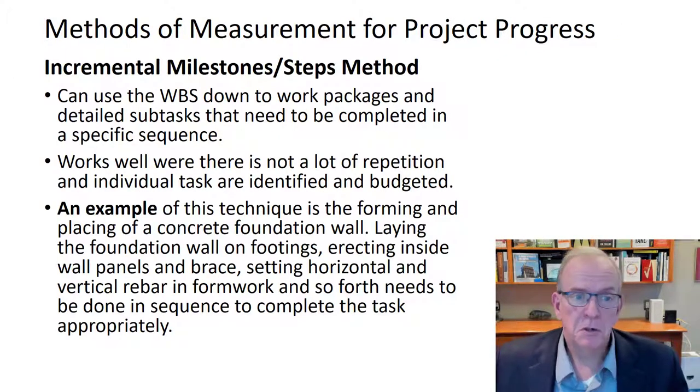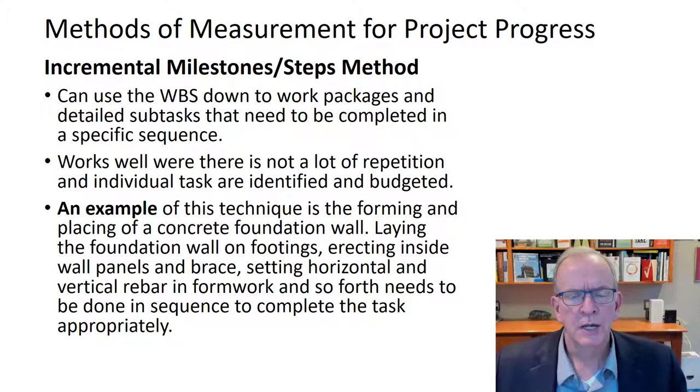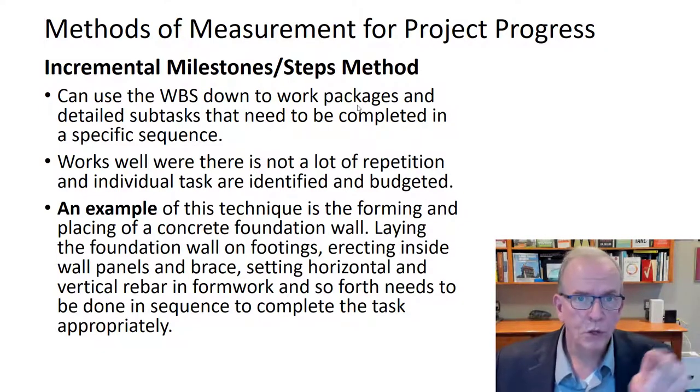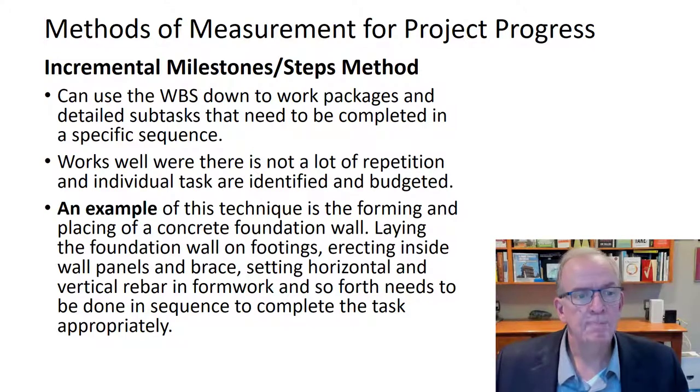But sometimes units aren't always that easy to come by, that it's so measurable, especially in construction. Sometimes we have a lot of different tasks and they're all integrating with each other, and that can become a little bit tricky. So we can also use what they call the incremental milestones, or the steps method, it's also referred to. And that's where, we've talked about work breakdown structures in previous classes, you can break the work down into work packages and get detailed subtasks that need to be completed in a specific sequence, your critical path that we've been discussing. So this works well where there's not a lot of repetition and individual tasks are identified and budgeted.